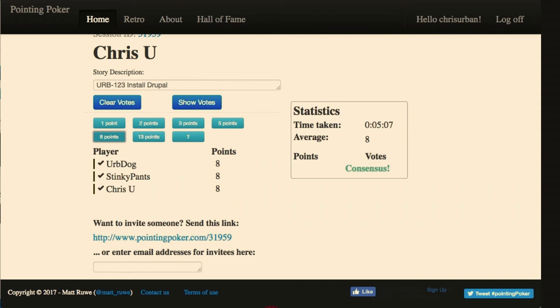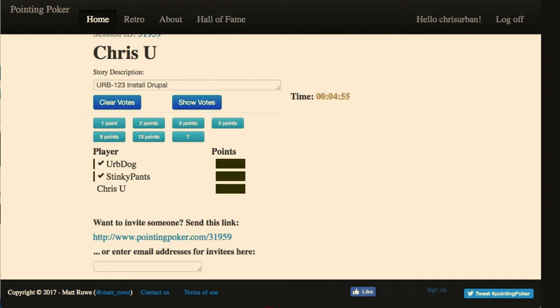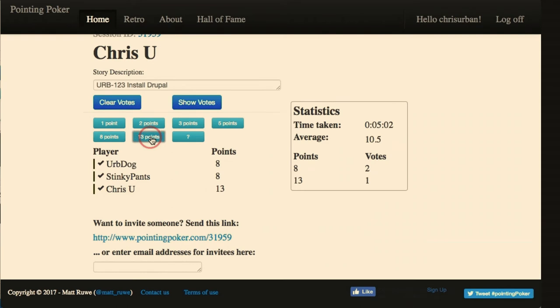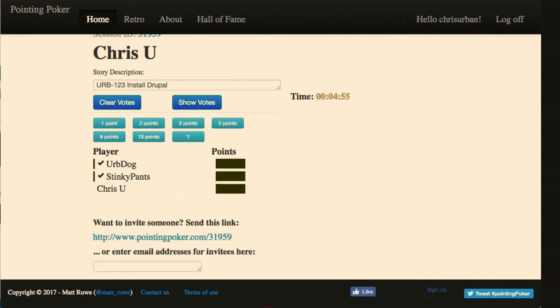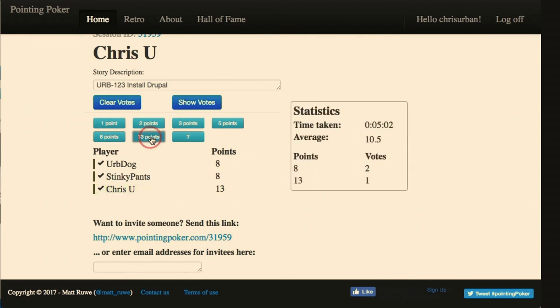Yes? So if you're in a maintenance mode and say we're using Kanban like we did in the past and you're just plucking the tickets from the top, is pointing necessary? That's a great question. So I would argue, yes, you should probably still do it because number one, it validates that the info in the ticket is correct. And by proof of sizing this, you kind of validate that, like everybody votes that it's an 8. This is a big piece of work, and it's going to take this person 2 weeks to get done. Again, because it still has to be measured against some kind of effort or some period of time to do this.